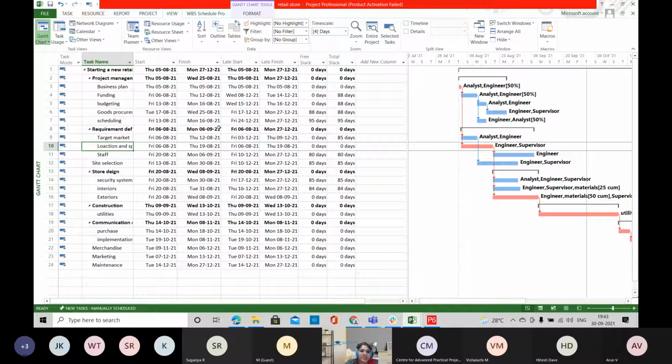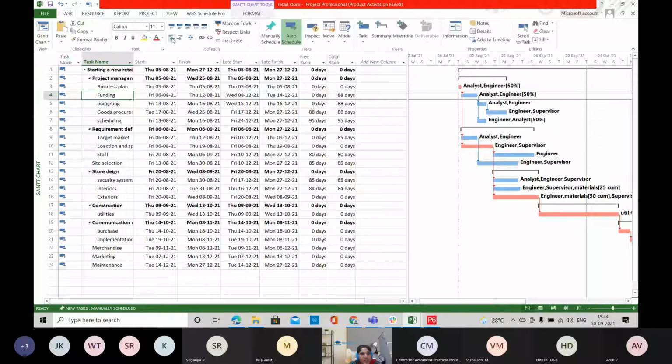And then you will be having the work breakdown structure. Work breakdown structure is dividing your project into a few, more manageable deliverables. For each and every deliverable, you can include activities. Here in Microsoft Project, you can do it with the help of the indent and outdent buttons. You can select the activities to be indented or outdented according to the project requirement. So the structure of the work breakdown structure will be formed here.